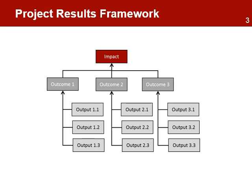The graphic also helps stakeholders understand the basic theory of how the project objectives will be achieved. The results framework has many variations, but most of them don't include the activities and only focus on the results: the outputs, outcomes, and impact. Activities and inputs are represented on the activity schedule.